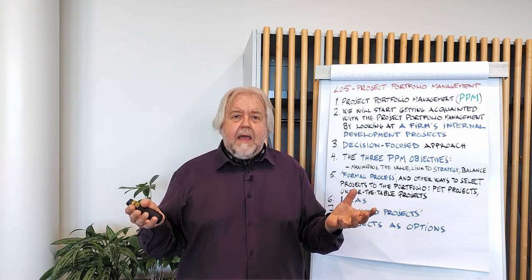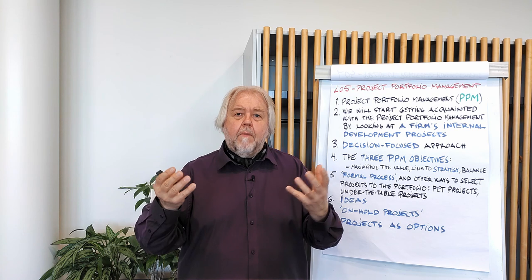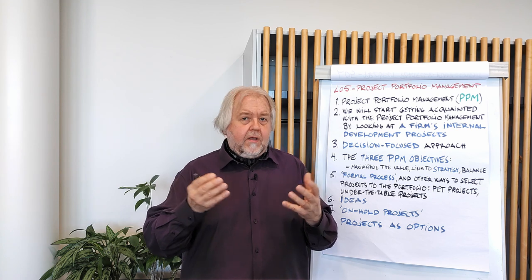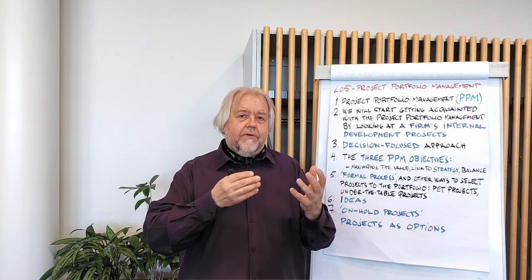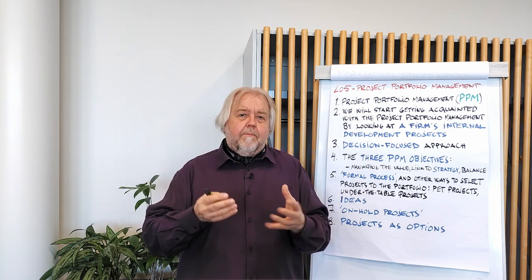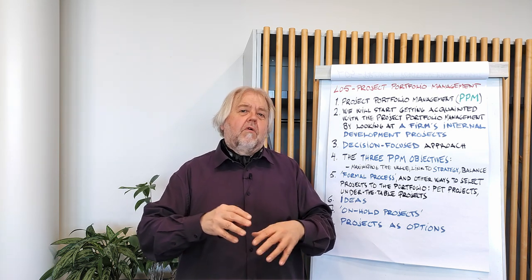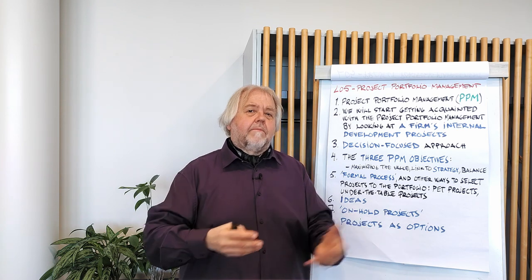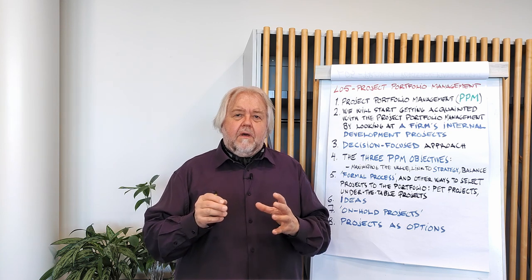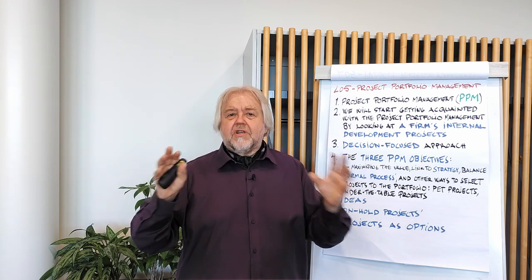And actually, I want us to have here a feeling of freedom to do those kinds of actions. So if we would have external customer delivery projects and we would have some contractual constraints, we cannot that easily put the project on hold or reduce resources on that specific project, or even kill that project, because then we would be, let's say, responsible for paying delay penalties or something to the customer.